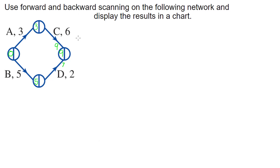Backward scanning works from the end node backwards. We start with whatever number the project finishes at and work backwards to find the latest start time of each activity. Looking at D: I take the nine and subtract how long D takes. If I can wait until minute nine to finish D, I can start D two minutes earlier — nine minus two gives me seven. So I can start D at minute seven and still finish by minute nine.